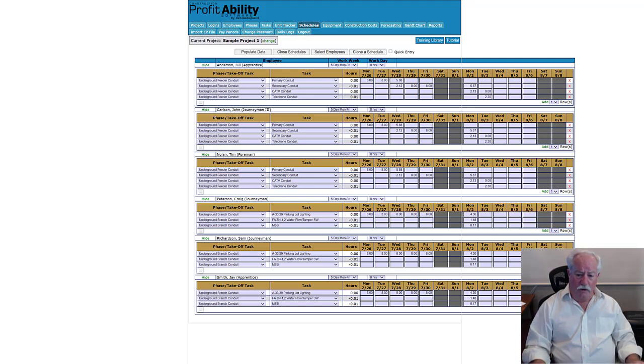And I got so frustrated, it's not really my job, but I went to the project manager and I said, you got to fix this. You got to fix it right now. This is a big problem for you. I guess he was able to speak to the right people and convince them I was right, and then they started looking for solutions like renting trucks and drivers and having their own people go get the sand, and looking for different contractors, but this went on so long it just absolutely slaughtered them.